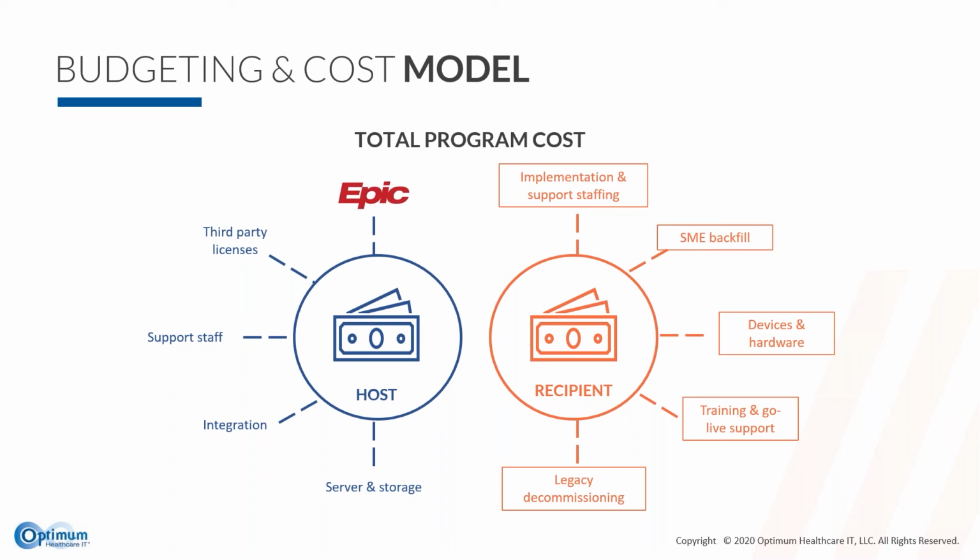Others will be less straightforward. So your support staff, for example, may not be something you had to look at before to estimate: if we bring on an additional provider, or an additional set number of beds, what does that mean for support numbers, both for implementation and then ongoing, for our different application teams? So you have to make some supportable assumptions along the way, and do some diligence to really figure it out and start to get to something that seems like it makes sense.